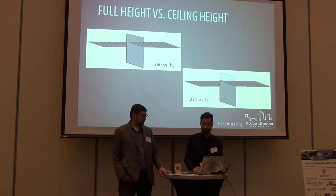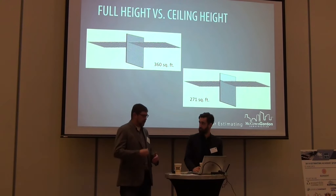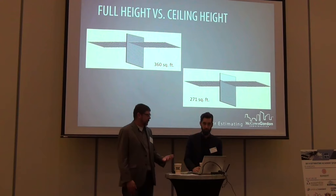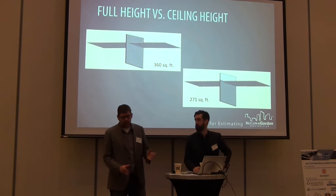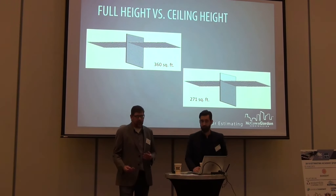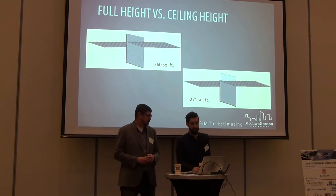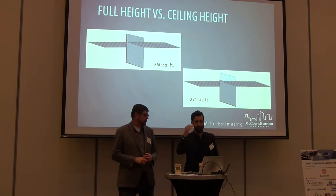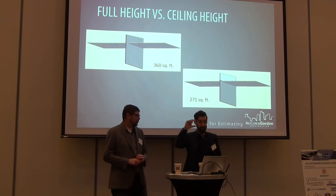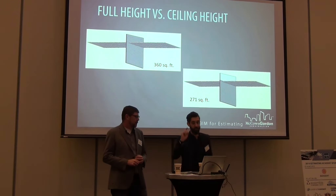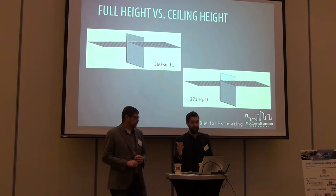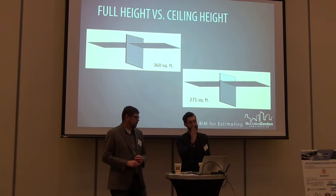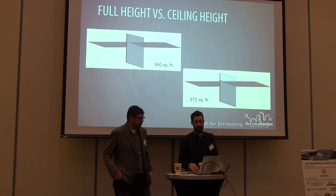Assemble has been responsive to that — we requested they include gross square foot as an output option. The same issue applies to interior walls: as an architect, I'd draw all walls full height with two layers of GWB, but I wouldn't necessarily stop the GWB above the ceiling. So you get an inflated value of sheetrock coming out of the model. That's not even how you'd estimate GWB anyway — you'd want to work in sheets, waste, and all of that. You have to know what kind of numbers you want out of the model and not just take them at face value.